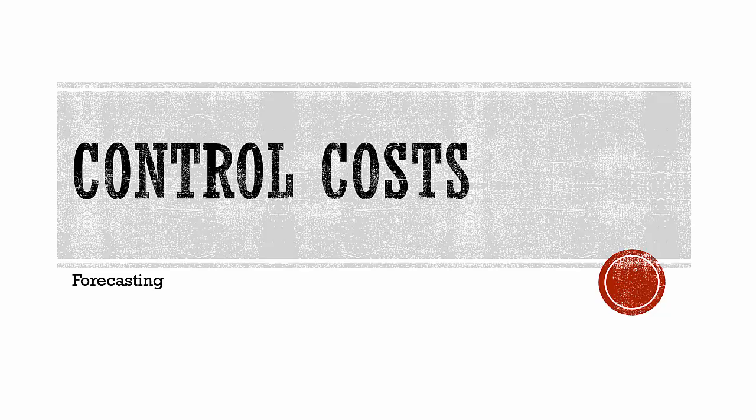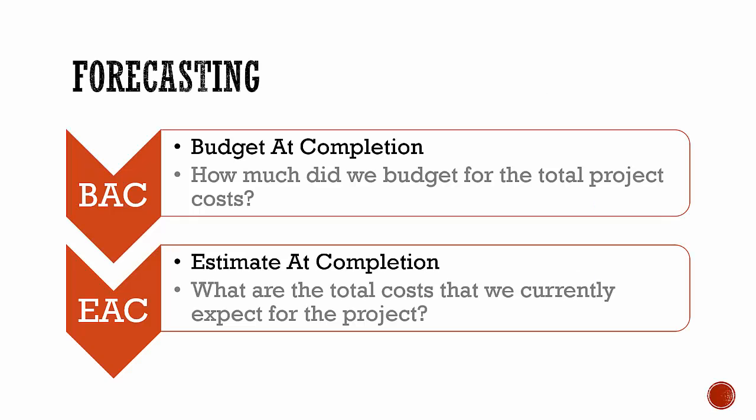Control costs – forecasting. In the process Determine Budget, the total project budget was developed and approved. This value is sometimes called BAC – Budget at Completion. As the project progresses and you observe its performance, it is possible to develop a forecast for the Estimate at Completion – EAC – that may actually differ from the BAC. Estimate at Completion answers the question: what are the total costs that we currently expect for the project?